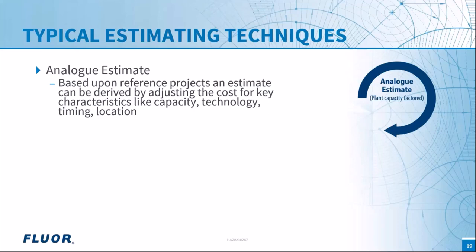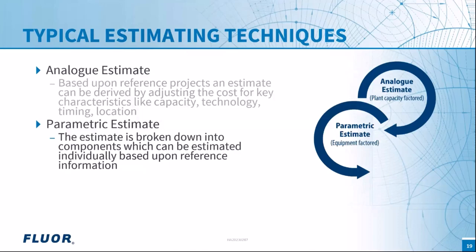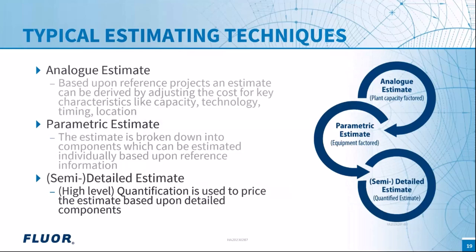The second technique is the parametric estimate, preferred when more definition becomes available. We break down the scope into smaller components estimated individually. A well-known approach is the equipment-factored estimate: we determine a cost for each piece of equipment — a pump, distillation column, vessel, compressor — and multiply by a factor covering foundation, piping, controls, and associated scope. This builds up the estimate with more accuracy, though it requires more time than the analog method.